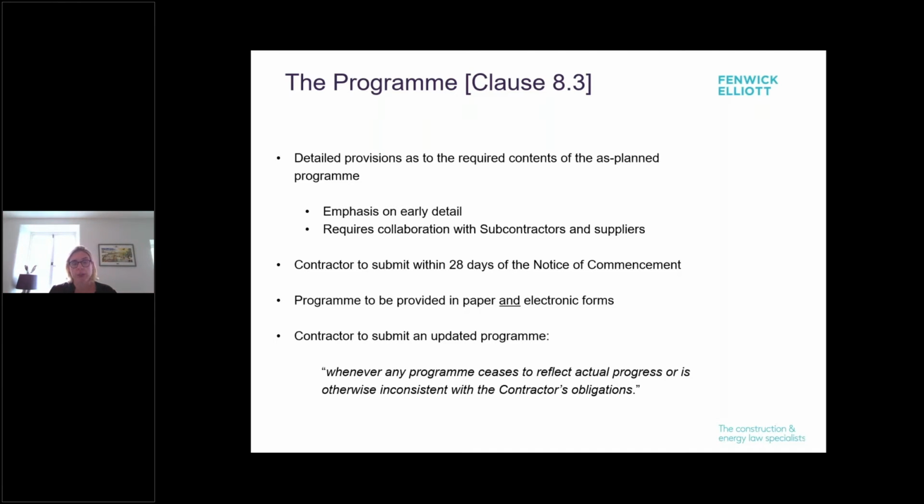So the contractor is meant to submit that within 28 days of the notice of commencement, and the programme is to be provided in paper and electronic forms, which is very helpful because it obviously allows a deeper level of analysis by the engineer to ensure that nothing is hidden in that, and everybody knows what is linking to what and whether that's sensible or not. So hopefully you don't get silly arguments about whether something was a critical activity or whether something flowed on logically, who owned the float later down the line.